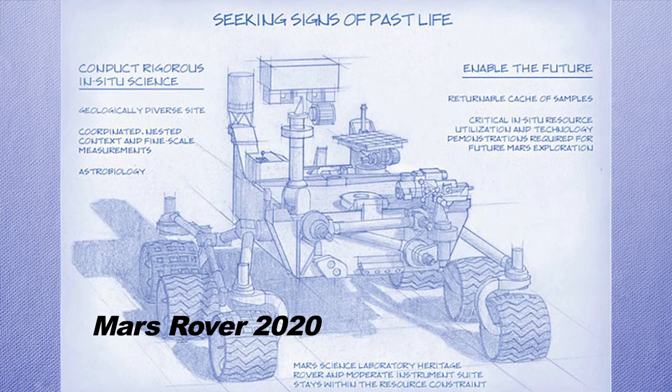For the Mars 2020 rover, it was easy to move to Phase A because there are some high-level requirements — they want to keep the budget within $1.5 billion. At that budget, the only way to do a rover on Mars the size of an SUV is to reuse a lot of technology and equipment from the past. So this rover will be basically designed around the Curiosity spare parts and Curiosity technologies.